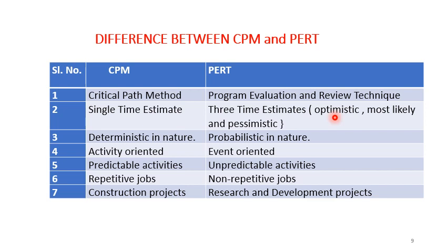If I take the pessimistic time estimate approach, probably the vehicle might not give a good mileage, probably it requires some maintenance, so you are taking that into consideration. Your delivery boy may take some extra 10 minutes there, and also you are expecting some traffic congestion during this peak hour. There could be some road blockages, a diversion, you have to take a different route, so in that case maybe 1 hour. So for the same job, optimistically you have said 20 minutes, pessimistically you are saying 1 hour.